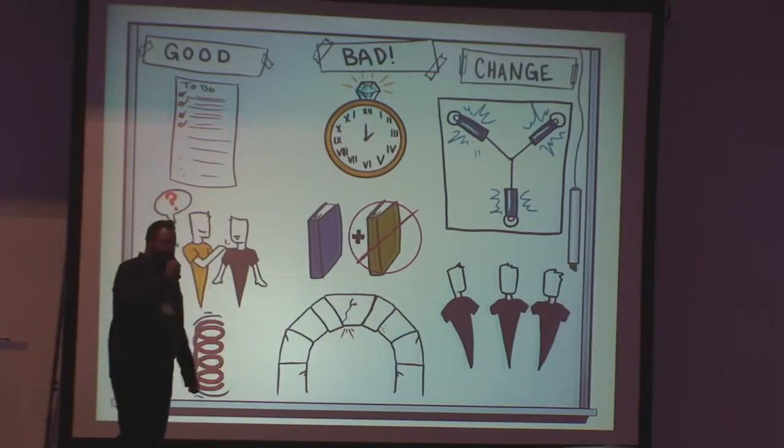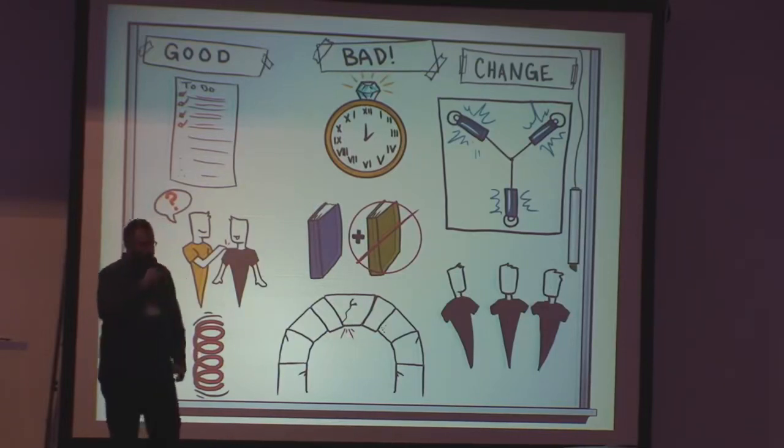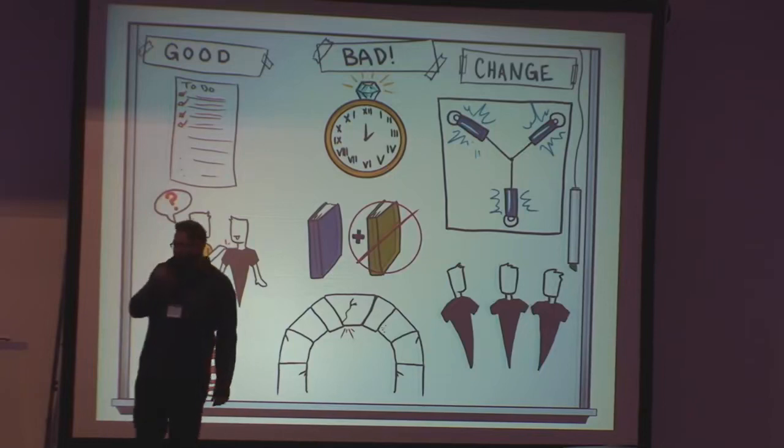So we realized we needed to move back in time. We needed to move earlier into this process and do these evaluations and determine the security implications earlier. We needed to do it before the planning meeting, and we also needed to distribute this among multiple security representatives, not just one.